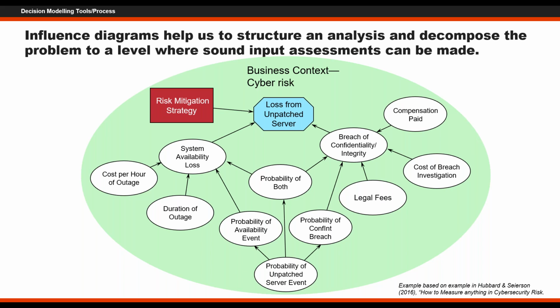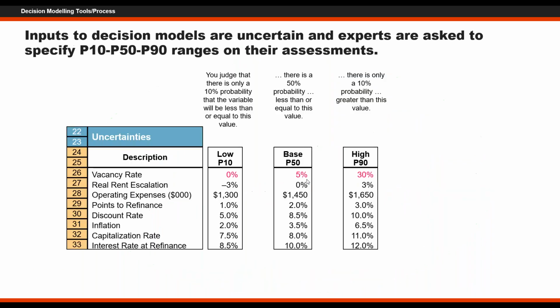If you're in the risk management function in an organization, you pick out your top 5 that you're working this quarter, taking them to an influence diagram and tornado charts and really getting big data, and they stay. Many of those come back again and again, and next quarter you add a couple more. So over time you build a portfolio of risks for which you have pretty good influence diagrams, reliability and relevance in terms of database for informing your judgments, and consequence models ready. So you build that portfolio of competencies in an organization, and usually the risk management professional might be working with certain functional or geographic parts of the organization that then become co-owners, understand it, and have a common language of dealing with it.